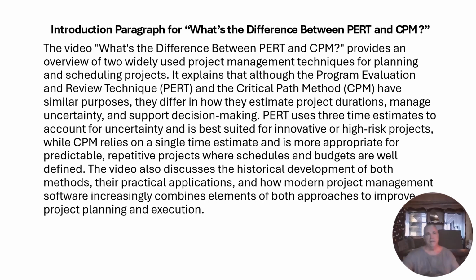I can see these techniques being especially valuable during the implementation of new information systems where a company opens a second location. Projects like this involve many dependent activities. Hardware must be installed before software can be configured, users cannot be trained until the system is operational, and final testing must be completed before the new location opens.